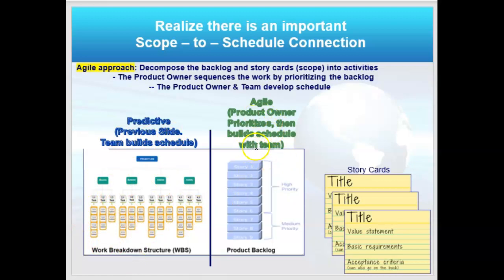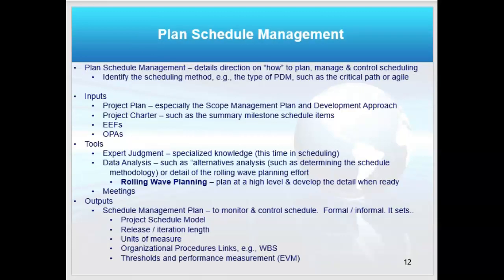In agile, I'm going to have a product owner and they're going to list a bunch of stories and put them in a backlog, right? And they're going to pile up. So these are the story cards themselves, right? I'm going to pile them up, and that's called the product backlog. That, in essence, is the scope they are working on.